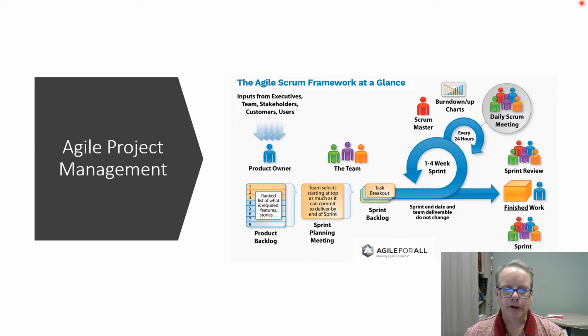At the end of each iteration, stock is taken of the progress in a sprint review. The requirements are updated, reprioritized, and the process starts all over again, with developers delivering on the next set of features or functionalities. This rhythm can continue over and over again until a project is fully realized or until the organizational priorities shift.